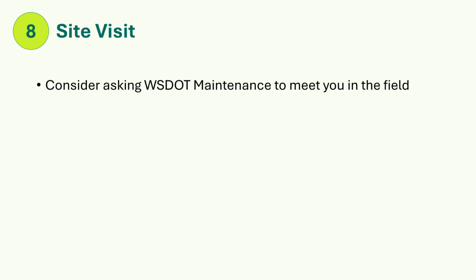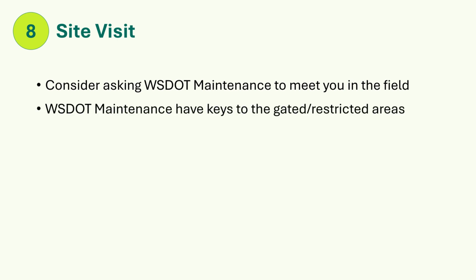Step 8. Site visit. You and your core team may want to consider a site visit to confirm the project definition, mission, and goals. Consider asking WSDOT maintenance to meet you in the field and discuss some of the issues they know about that you may not be able to observe yourself. They are a wealth of information. WSDOT maintenance have keys to the gated and other restricted areas.